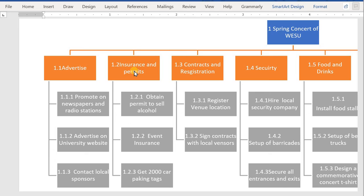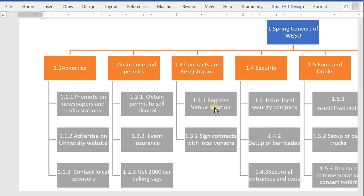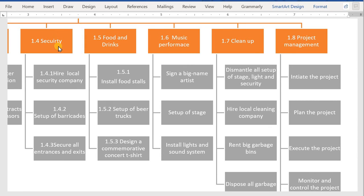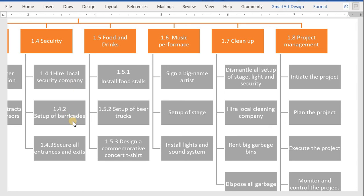Second, we will obtain our permits, in which we will obtain a permit to sell alcohol. We will also get event insurance, also 2000 car parking tags. Third is Contracts and Registration, in which we will register our venue location where we are going to organize our concert, then sign the contracts with the local vendors. Then next part will come under the Security section, under which we will hire the local security company, then set up barricades so that we can put the boundaries for the concert, then secure all the entrances and exit points.